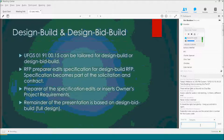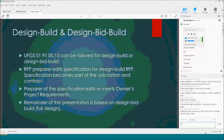The owner's project requirements document should be included in the specification when edited for Design-Build. In no case should we be letting the construction contractor post-award write a document that tells us what our requirements are. We're already writing an RFP — all we need to do is consolidate the relevant information into an OPR and include that document in the solicitation package, marked for information only so that if there's a conflict, it's not part of the contract. For the rest of the presentation, we'll concentrate on Design-Build.